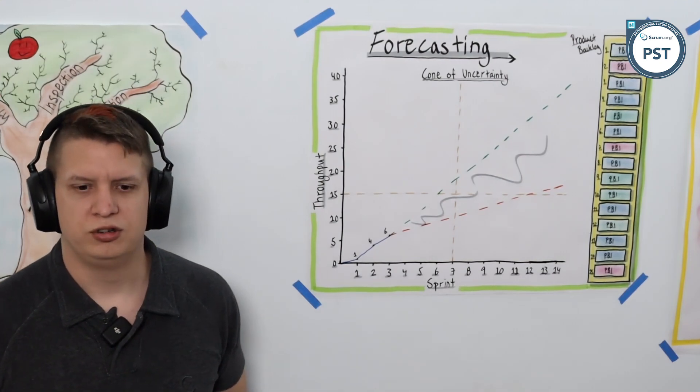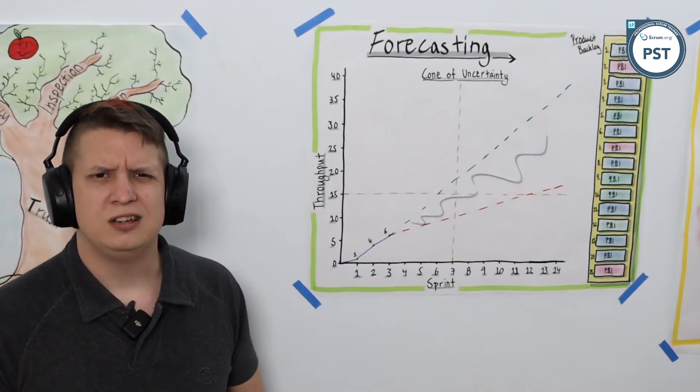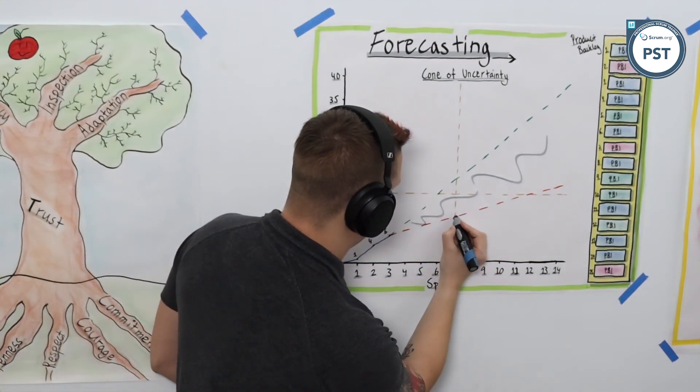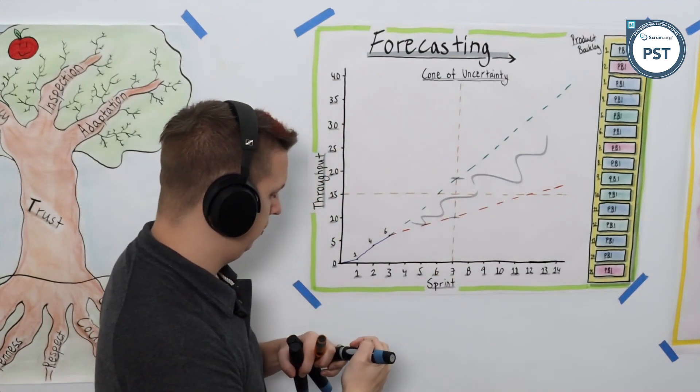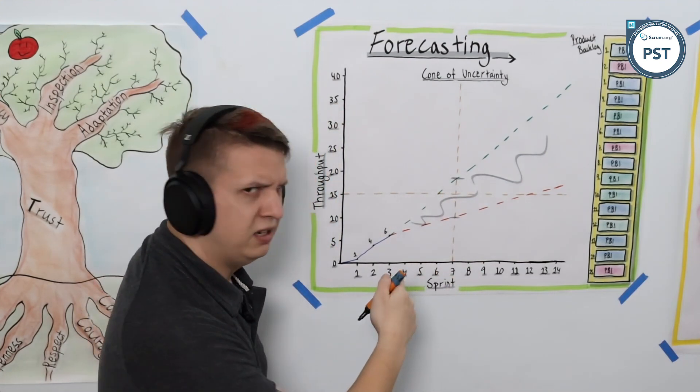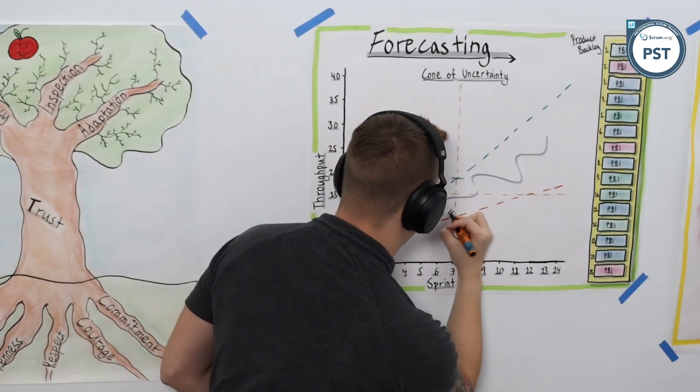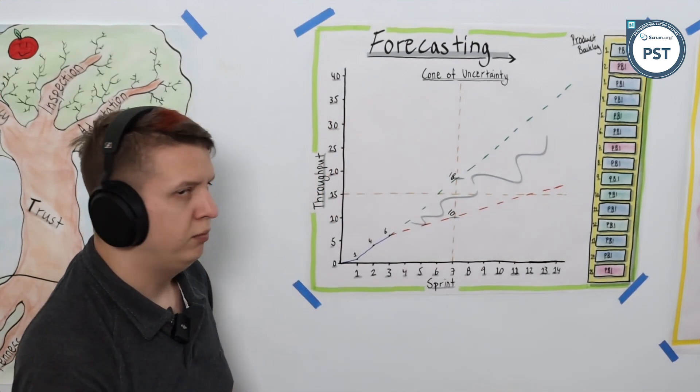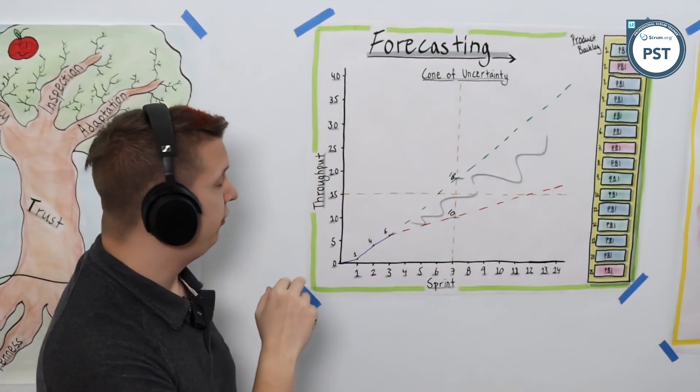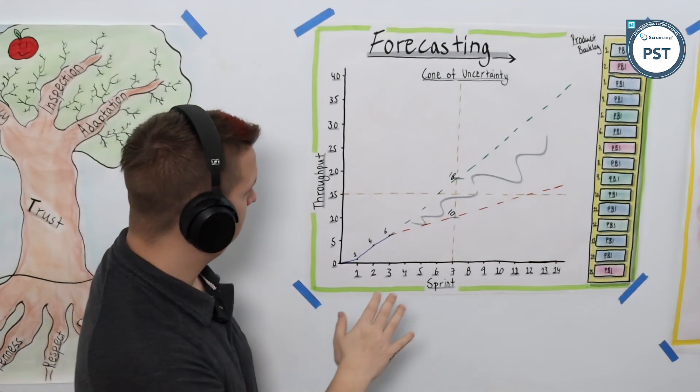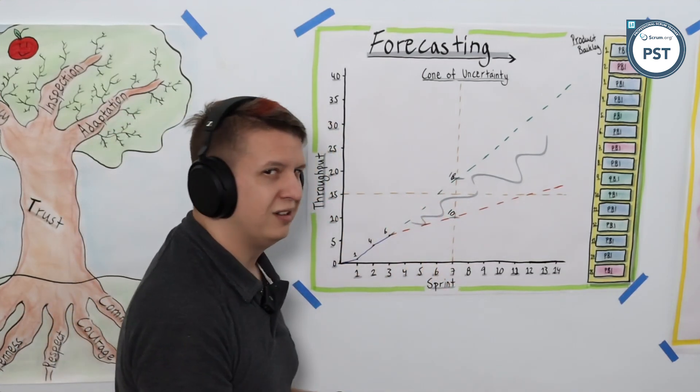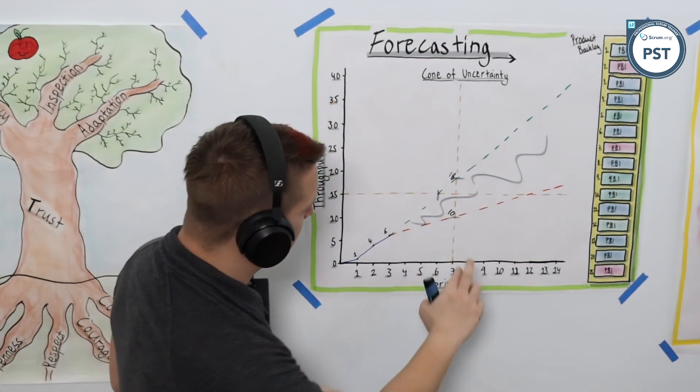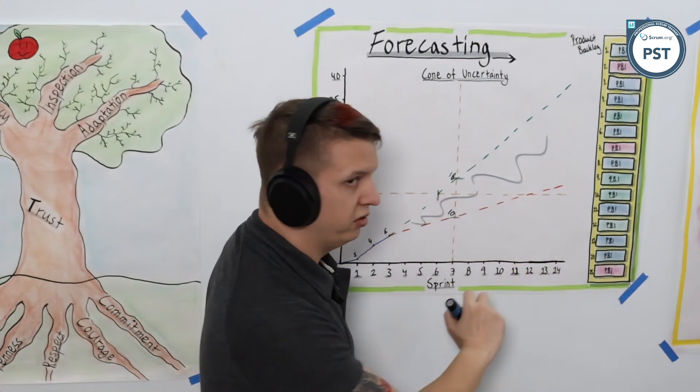If we start with answering that question of how much do we think is going to get done by sprint 7, well, over at sprint 7 somewhere between these two data points, that's probably around 10 items or 18 items. And if we look at when will we get 15 items done by, well, looking again, 15 best case scenario probably around sprint 6 if we're very lucky, and if we're very unlucky probably somewhere around sprint 12.